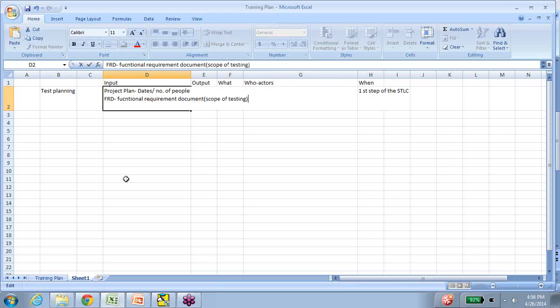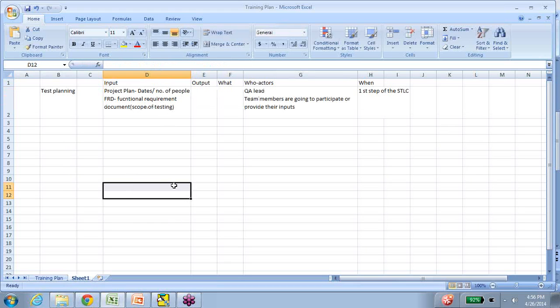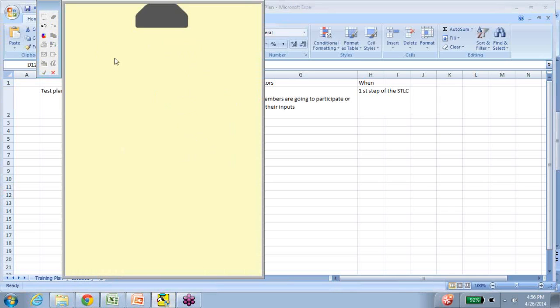We have to know how much is the extent of the application. Say, for example, there is an application that runs 10 web pages and has probably 150 features implemented on it. So you need to know the size of the application, the complexity of it. You need to do some sort of analysis to come up with how much time it's going to take for us to test. So if there was a previous application that you tested as a team, that had like 10 web pages and a number of features close to 150 features,